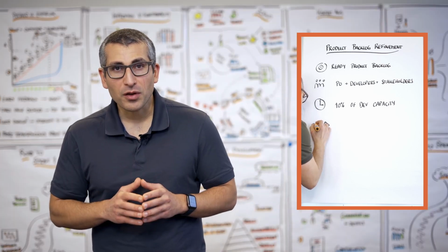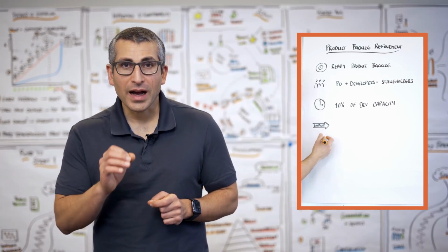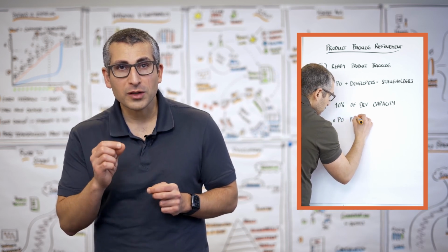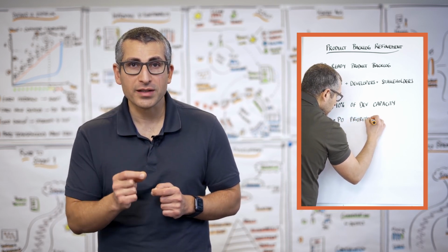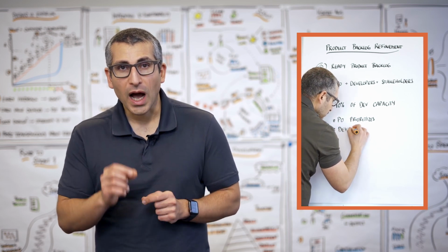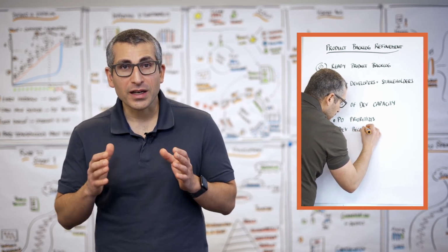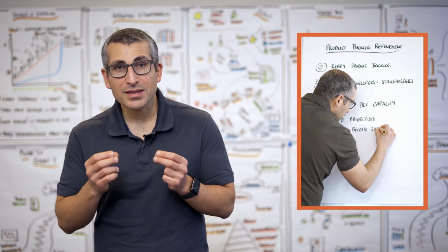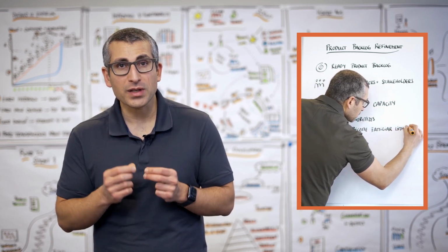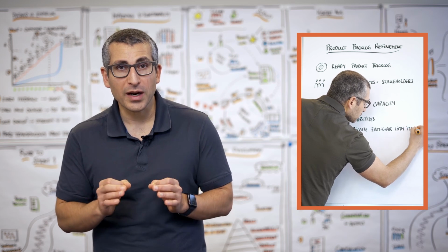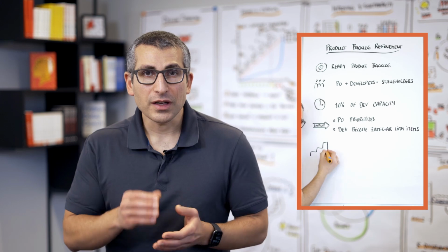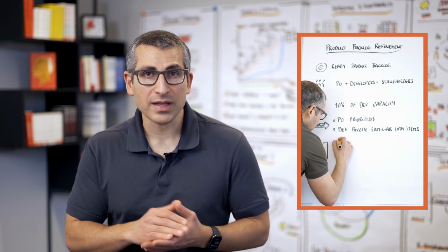As preparation for the product backlog refinement, I highly recommend every product owner to go through that product backlog and prioritize it from a customer perspective. Also, I would recommend to developers to take a look at that product backlog and get a sense of whether there are technical dependencies between those items, so that they are well prepared for the activity itself. The refinement itself is usually conducted in various steps.